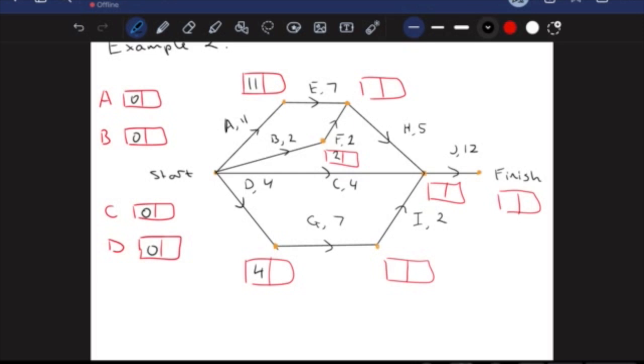And here is where some of those issues we talked about arise, okay? Because as you can see here, I have 2 possible numbers that I can get in here, right? I can either get, if I follow this path, 11 plus 7 gives you 18. So that's one option. Or I can go 2, and 2, which gives me 4. So how do we know which one to pick? Well, when we forward scan, we are always going to pick the larger number.